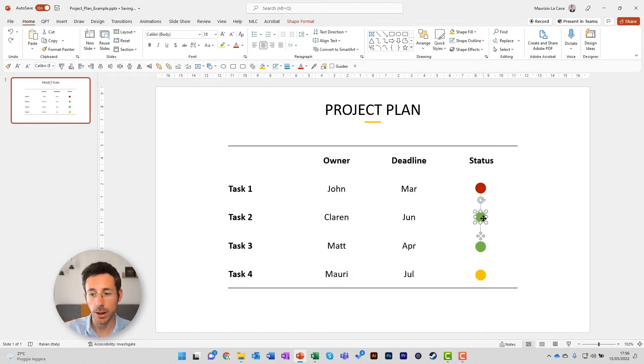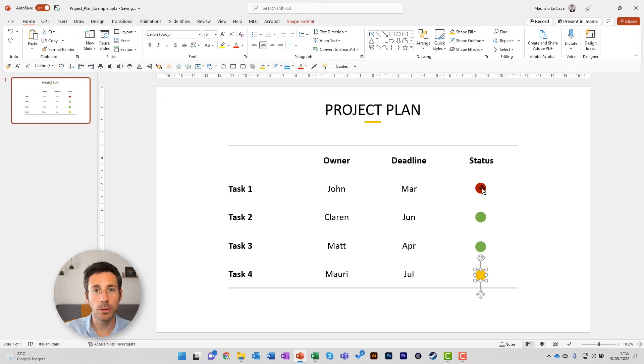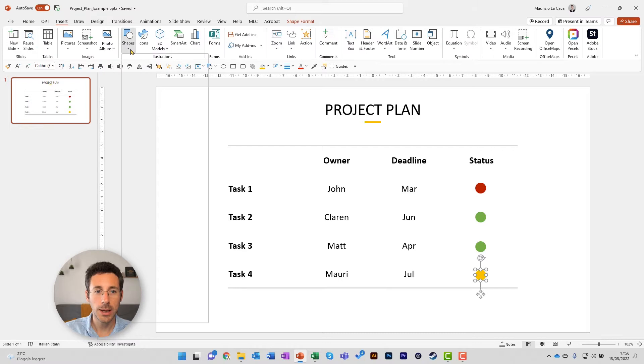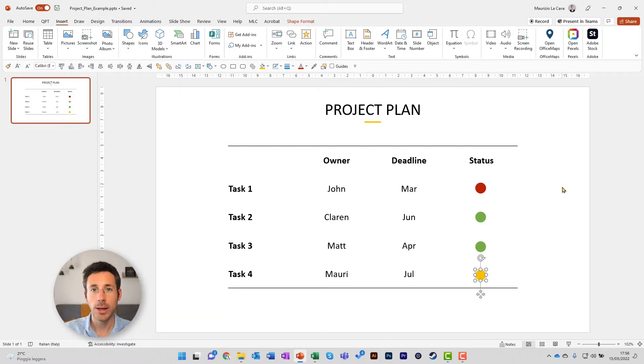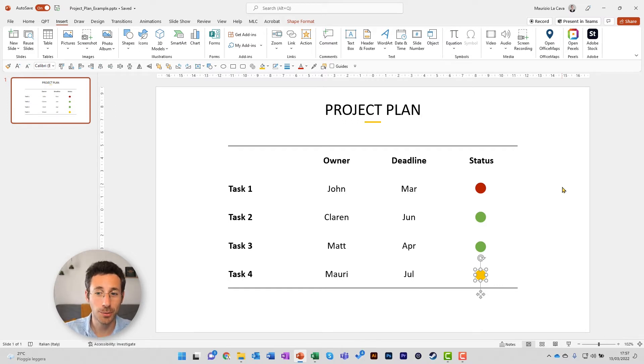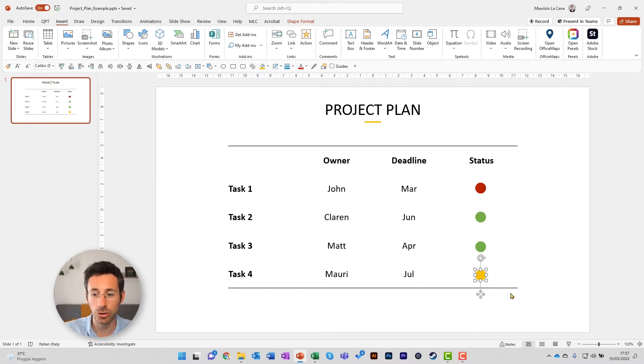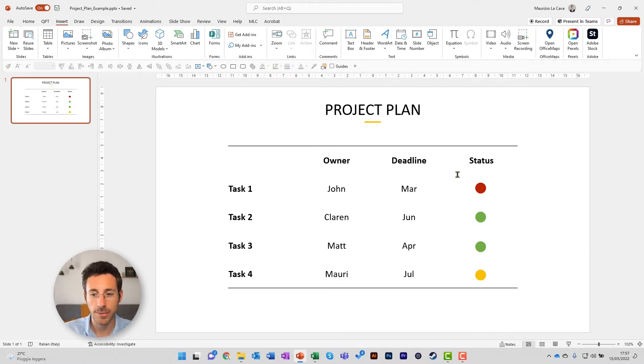The status is marked by simple icons. I made those circles from insert shapes and oval, and then I gave them a color to respect the traffic light system to track the project. Red is off track, green is on track, and yellow is in progress.